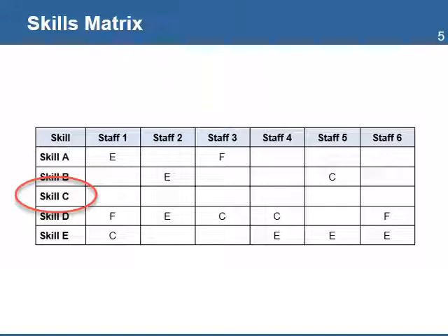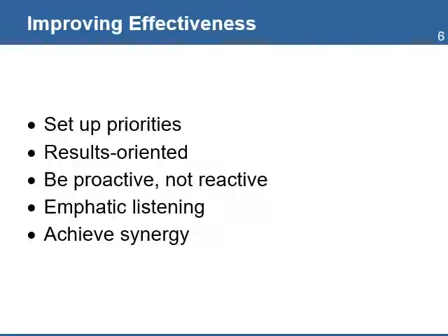You can use the skill matrix as a guide for the development of a training plan for the team. When a specific high level of skill is needed by the project and is not present in the team, then it's necessary to find an outside subject matter expert to fill that position at the time the project demands it. This additional resource is usually a consultant who brings the skills that can be used immediately by the project. This approach sometimes is faster and less expensive than building the skills internally, especially if it's needed only once.